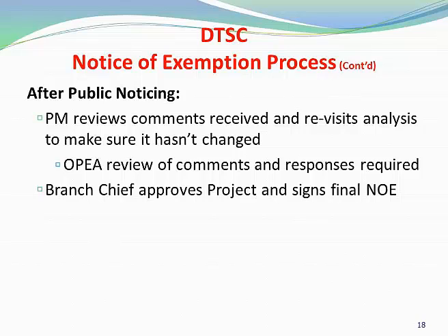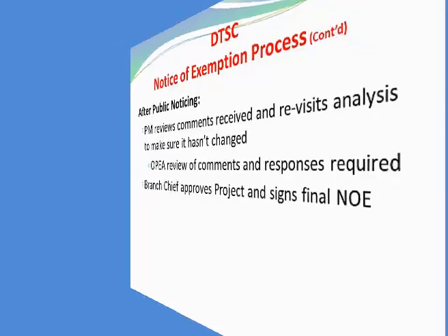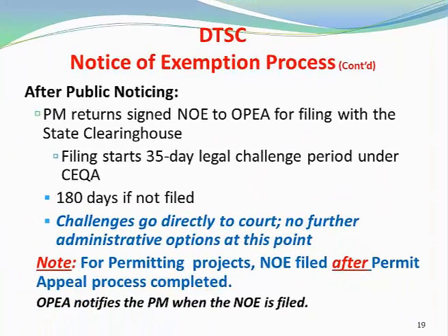After the public notice ends, the project manager reviews the comments received and revisits the analysis to make sure it hasn't changed. And please note that OPIA's review of the comments and responses is required. The branch chief then approves the project and signs the final NOE.